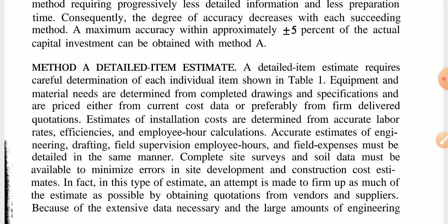Estimates of installation cost are determined from accurate labor rates, efficiencies, and employee hour calculations. Accurate estimates of engineering, drafting, field supervision, employee hours, and field expenses must be detailed in the same manner. Complete site surveys and soil data must be available to minimize errors